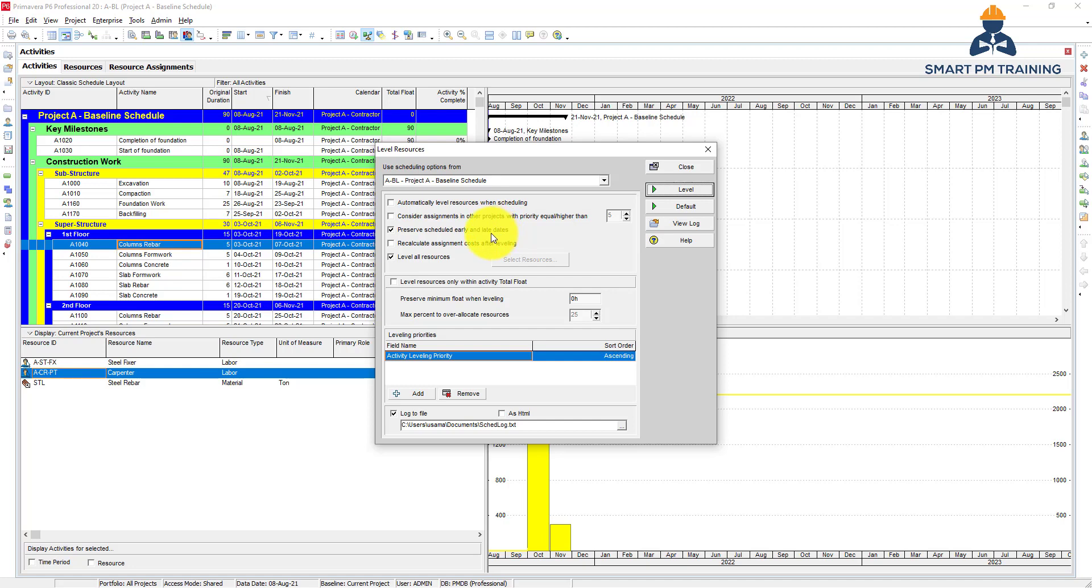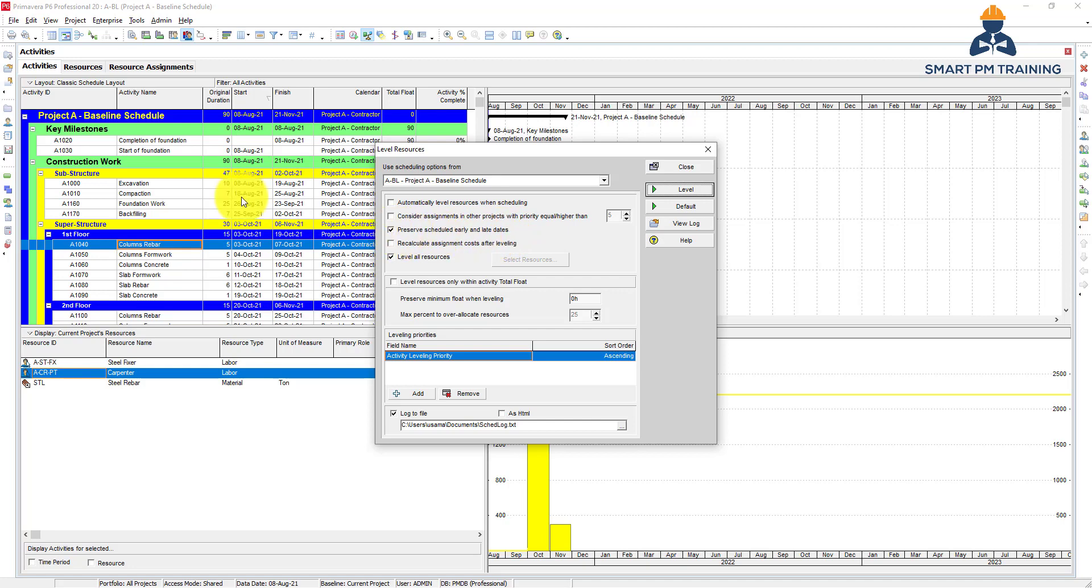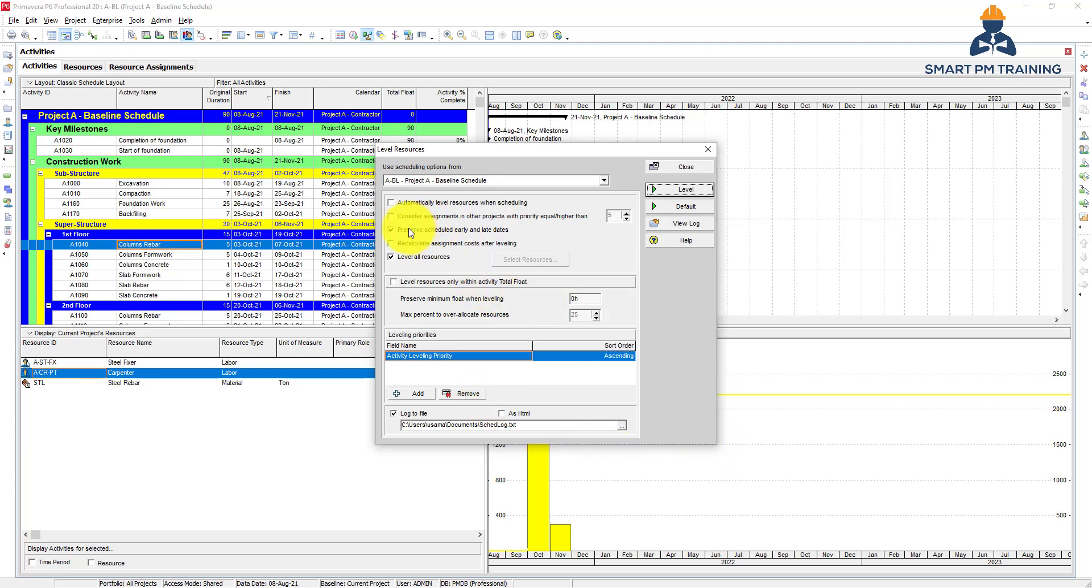You want to preserve scheduled early and late dates because if you let it as is, Primavera will change duration, start, and finish to optimize for you. So you have to preserve it - you want to keep the start and finish and nothing else will change in the program.